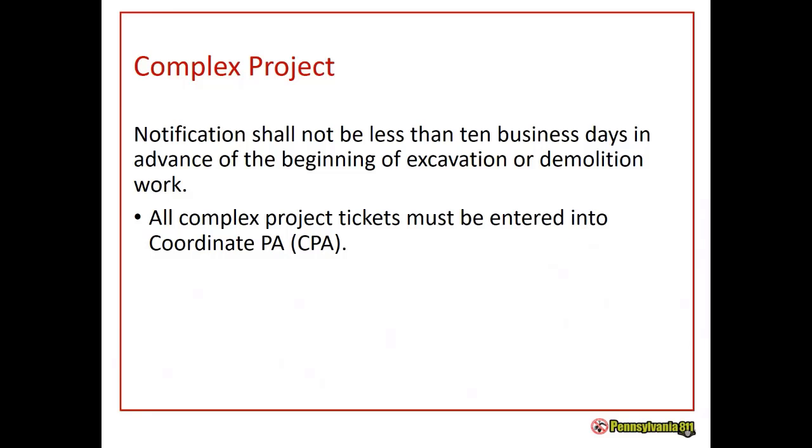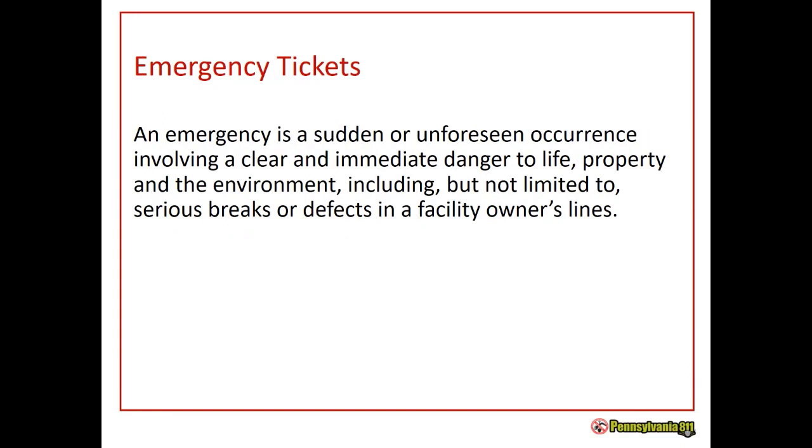And is it complex? There's many different variations of what makes a project complex. So just keep that in mind. We use the acronym DISC: duration, impact, size, and complexity. In the end, it's up to the project owner, the designer, or the excavator to determine if a project is going to be complex. Let's discuss the emergency tickets now.